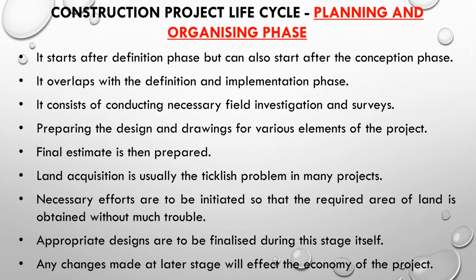Appropriate designs are to be finalized during this phase itself. Any changes made at a later stage will affect the economy of the project significantly. Thus, planning and organizing phase is one of the most important phases in the life cycle of a construction project.